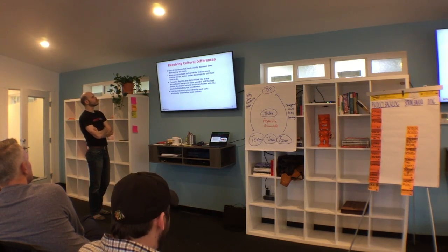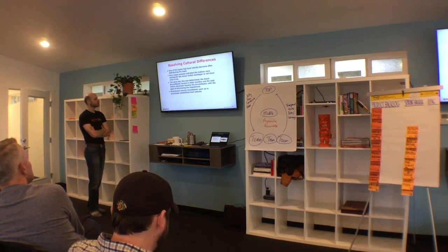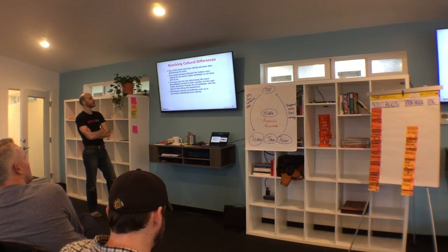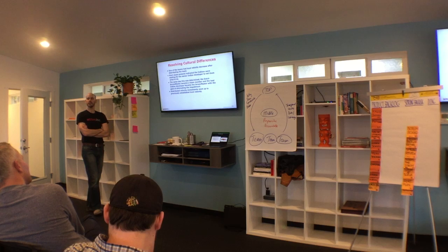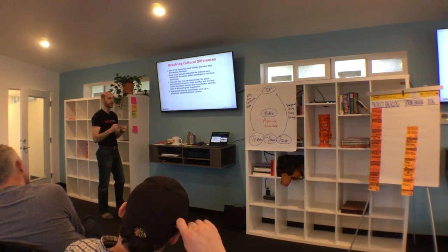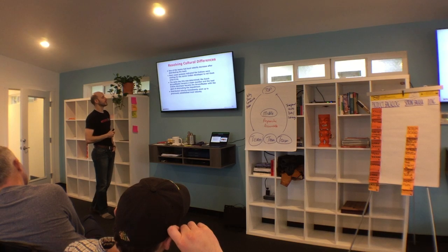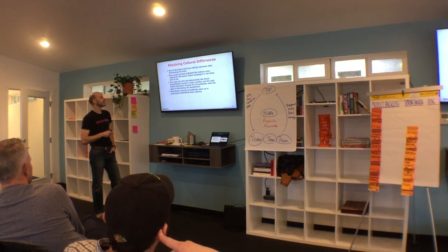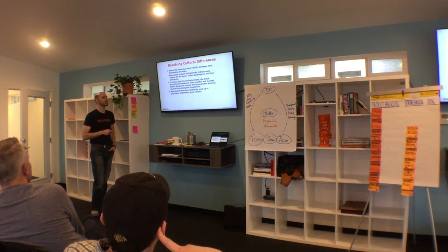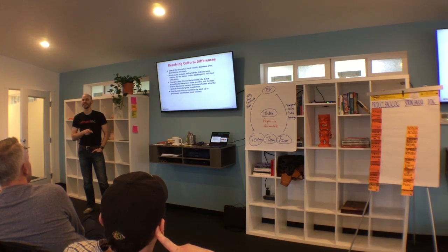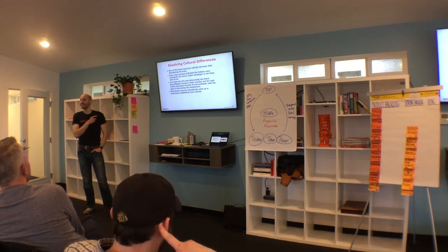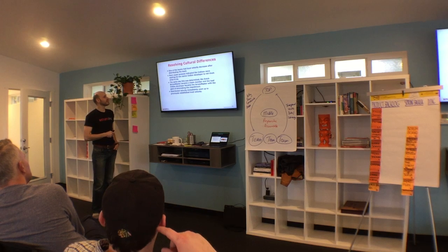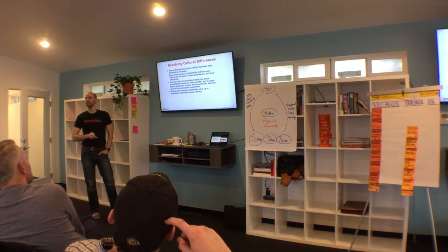One of the teams had a local velocity decrease after flying back to India. Root cause analysis indicated the Indians were waiting for a senior Indian developer to tell them what to do. They weren't self-motivated to grab backlog in the best order they thought. The same day this was determined, the Dutch Scrum Master demoted themselves, or changed role, to become a team member, and the lead Indian developer became the Scrum Master with the goal of solving this problem. You see what they did there? That was smart. And they did that the same day. I mean, that was quick thinking. Distributed velocity immediately went up to previous established local velocity.